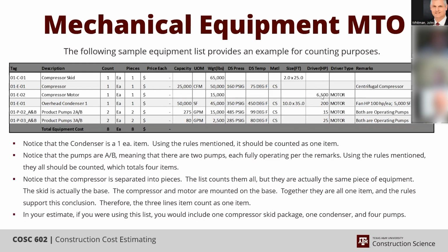But outside of that, the seal is going to vary a little bit. So your labor is going to be very similar, but your price can be very different. So the point system, as you're calling it, works, but you have to have multiple lists of point systems so you know what type and horsepower. Normally, cross-reference. That's important.